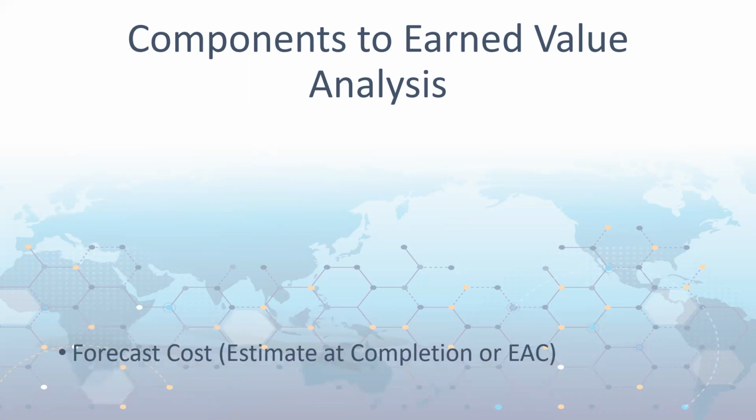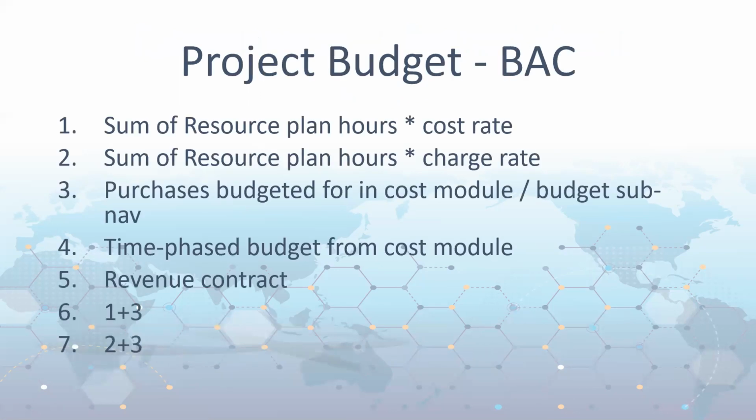And so if we get all of that, what we can do is combine those metrics to use a formula to generate a new estimate at completion, and compare that to what we're using through other methods, which could be bottom-up remaining hours forecasted, slippage in a schedule, and just compare those changes to what our algorithm is saying as an estimate of completion. So those are the components of earned value. Now what I'm going to do is take you through each of them.